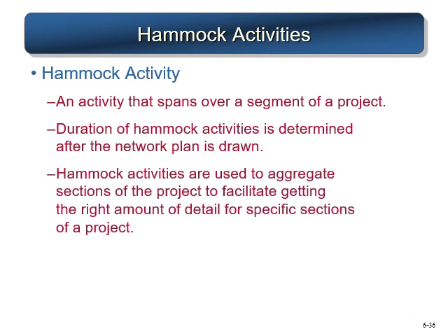Hammock activities: an activity that spans over a sequence of a project, or over a segment of a project. So that part is a hammock, which swings those activities together. The duration of the hammock activity is determined after the network plan is drawn. The hammock activities are used to aggregate sections of the project to facilitate getting the right amount of detail for a specific section of a project. So we can give some special attention to those activities which are in that hammock.